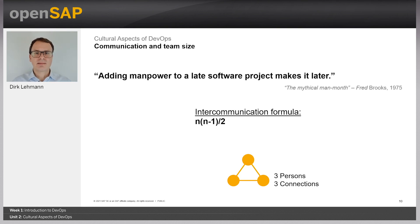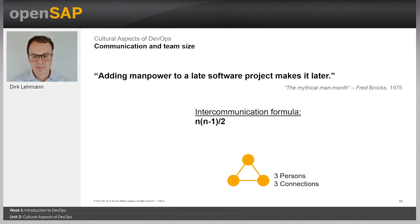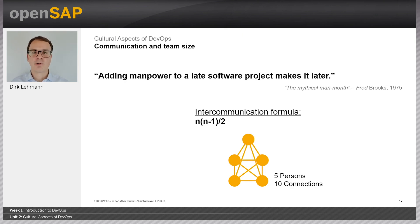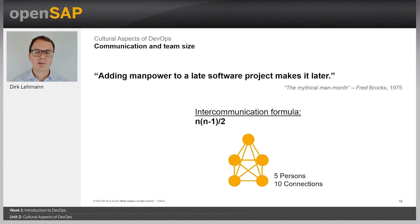If you have 10 people working on a software project and you add another 10, it's not half the time — it's most probably double the time. Why? Brooks describes the problem as mainly about communication. He presents an intercommunication formula where communication grows by the square. The more people you add, communication goes up by the square. With three persons you have three connections, four persons gives six connections, five persons gives ten connections, and so on. At some point, the communication overhead is just too high and productivity breaks down.